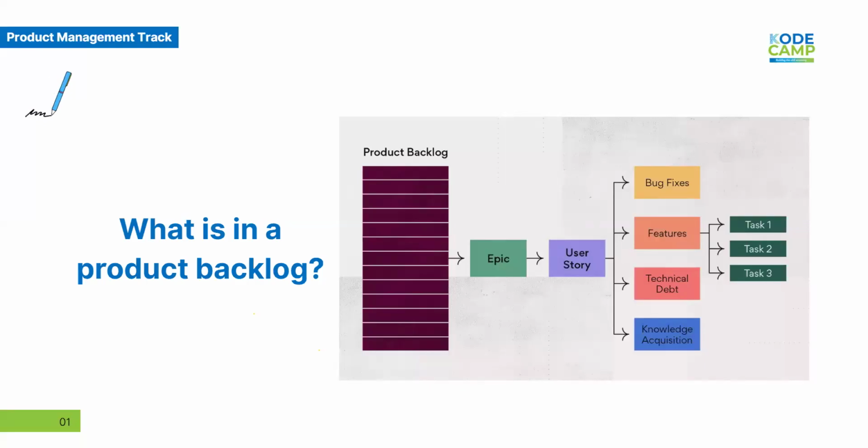And you also have to prototype the flow for biometrics login. And you also have to conduct user interviews to test the acceptance criteria of facial login from the users. Now, at this point, you're not yet delivering any feature, right? You're still gathering data, but it's still your work. It's still a job you're doing. You're still working. It still needs time allocated to it, right? It needs resources. So it should be visible. That is why it is added to the backlog, right?